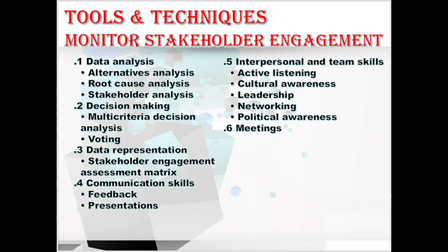Let's move to tools and techniques. First, we have the data analysis technique, which contains alternative analysis, root cause analysis, and stakeholder analysis. Alternative analysis is used to evaluate the options to respond to variances in the desired results of stakeholder engagement. Root cause analysis (RCA) is used to determine the basic underlying reason that stakeholder engagement is not having the planned effect. Stakeholder analysis helps determine the position of stakeholder groups and individuals at any particular time in the project.